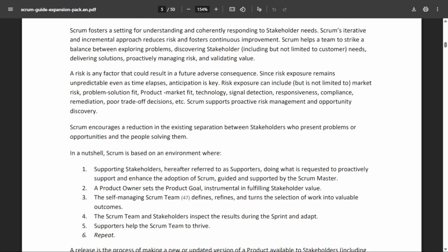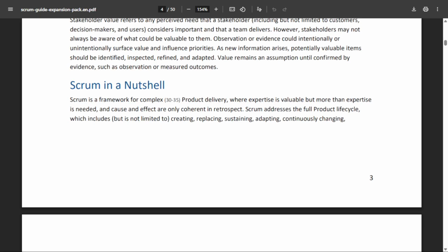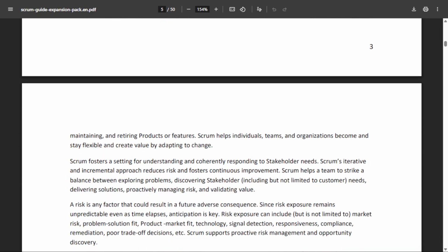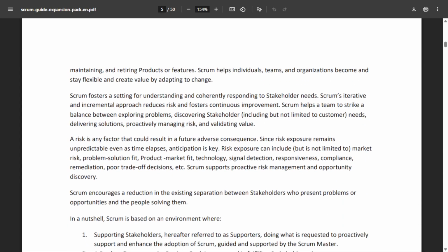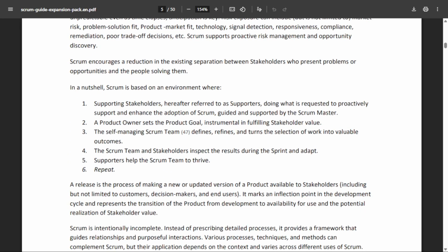Moving on to this view of Scrum in a nutshell, which you see here. In a nutshell, we talk about a 3-5-3 configuration for Scrum: 3 roles, 5 events, and 3 artifacts. And we can say that Scrum is a framework for solving complex adaptive problems. We have time-boxed iterations known as sprints that produce usable increments. The Scrum team is self-managing, cross-functional, and they collaborate relentlessly with stakeholders.